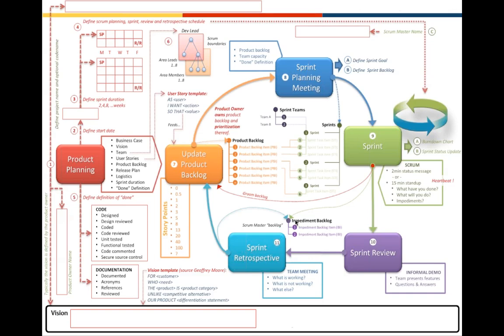The idea is that you have a good idea about what stories you're going to do in which sprint. So it's a good idea to start parking your user stories in future sprints. Okay, it is a great way of understanding dependencies as well. Ideally, user stories should not have dependencies. Okay, but of course we do not live in the ideal world. There are dependencies, no matter how much we try to avoid them. So if you start parking your user stories that you have in your release backlog, you would understand the dependencies.